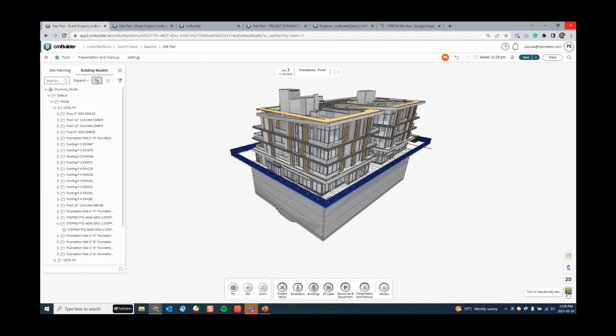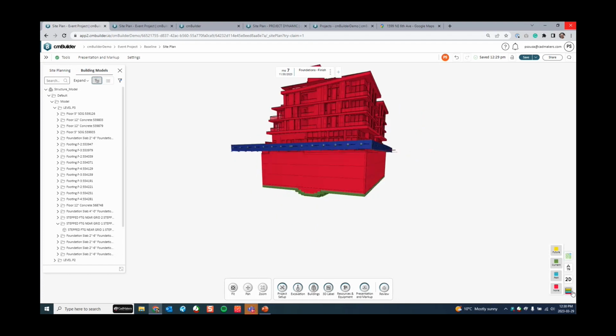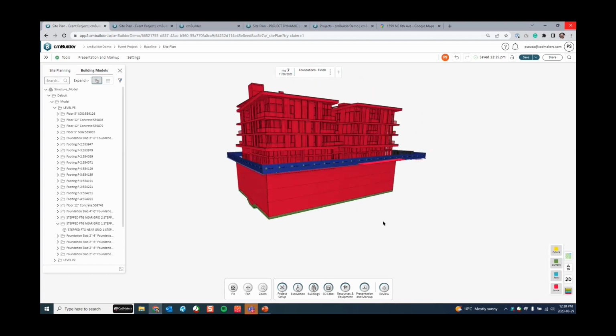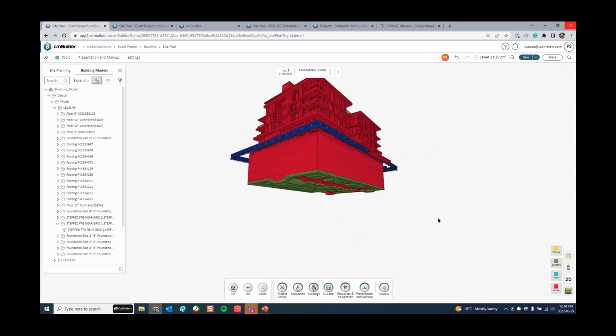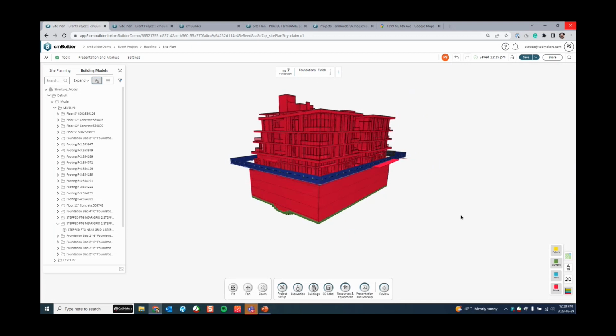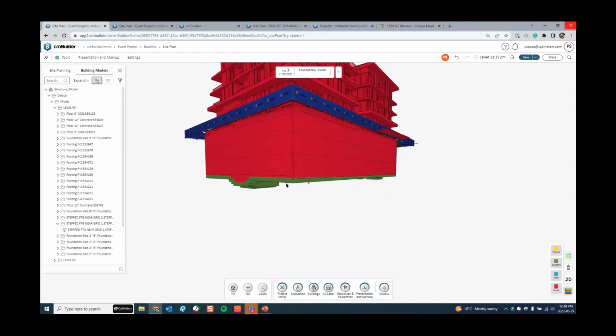When you click the color coding, it will highlight the parts in your model as none, past, current, or future. None are all the parts that are not classified or not connected to any milestones. Past are parts that are in the past. Current are the parts that are being executed at this milestone, and future are the parts that are in the future.